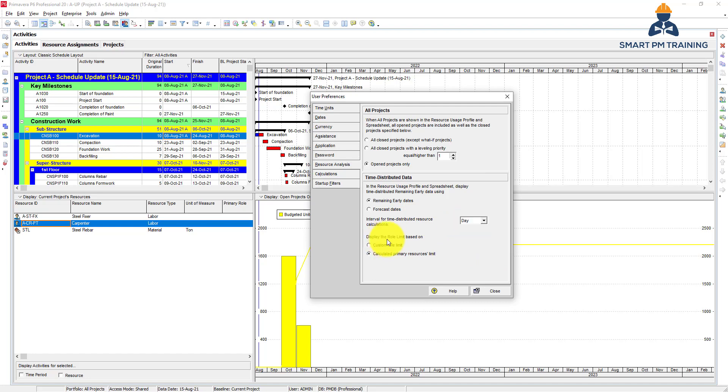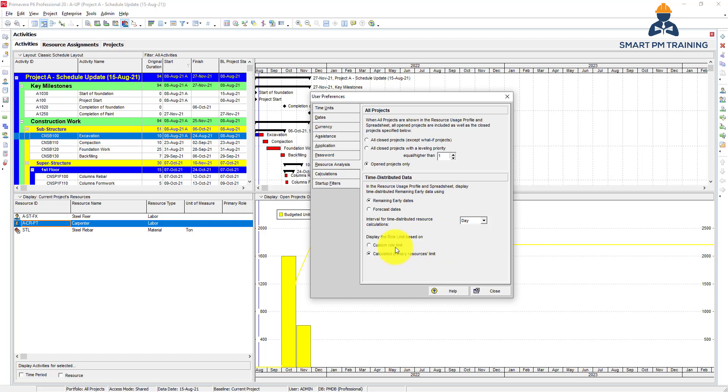The interval for time distributed resource is day by default. And also display the role limit based on, so when we created the resource we have also resource role. We talked about it. You can go back to that video and check it if you forget about it. So the role limit here is based on the associated or linked primary resource limit as well, not another custom role limit for the role itself. So it's up to you, but by default resources are linked to roles. So if I have primary resource limit, I have also the same role limit.